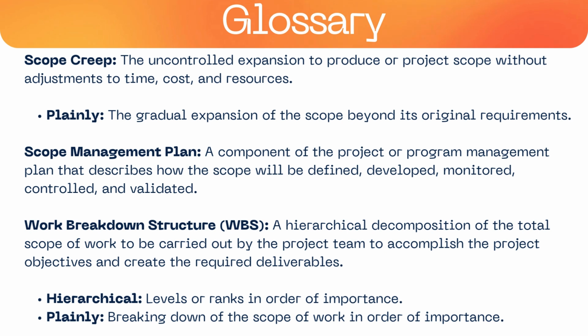Your scope control establishes procedures for managing changes to the project scope, including how the scope results will be evaluated and approved to prevent scope creep. Like I said earlier, scope creep is a spanner in the works that you do try to avoid. It is when extra responsibilities are added to your scope without the expansion of resources. So this is where we've got a little bit of a problem. With your scope control, you want to evaluate all change requests to ensure that there isn't scope creep.